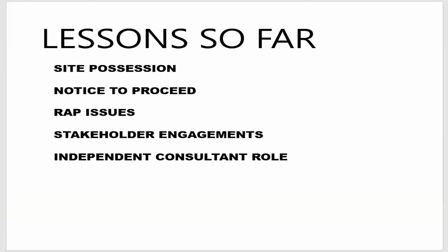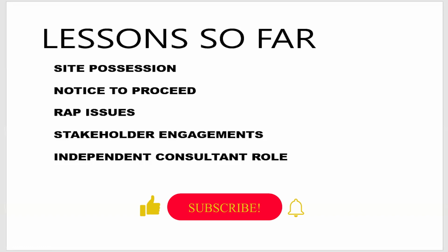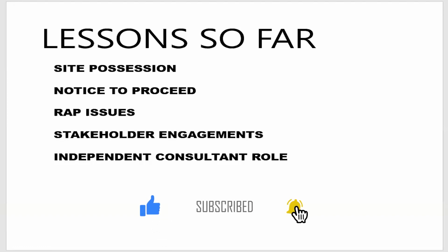The major lesson that we are also learning has to do with the design. The contracting entity under OPBRC is responsible for design. But the arrangement that we put in the contract is that the client must approve that design.